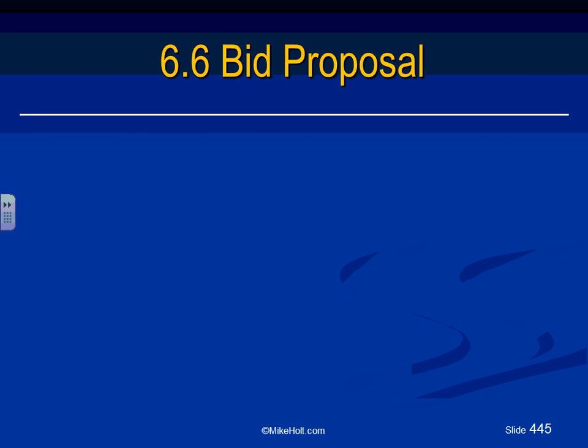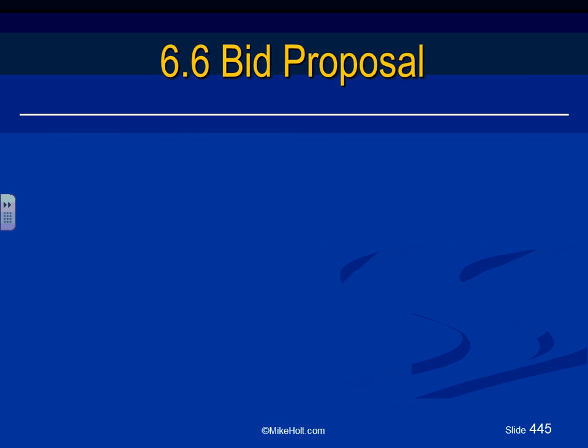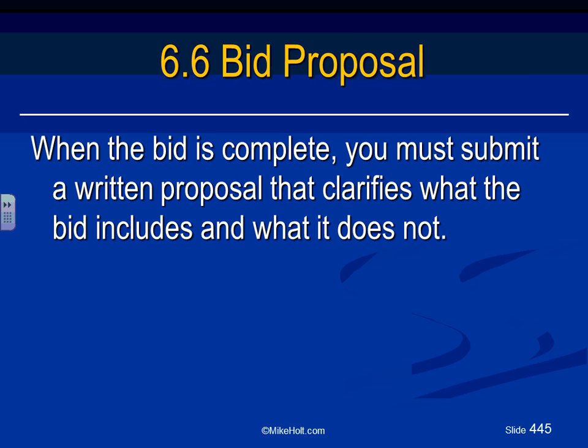Again, it takes experience. Okay, after we analyze the bid, Andrew, my friend, we need to shoot that bid all the way to where? To the proposal. Now we need to take our bid to the proposal. Any comments, guys? Any questions? So you take your prime cost, break-even cost, add the profit to it. That will be your selling price, after you add a couple of extra things, unanticipated costs.